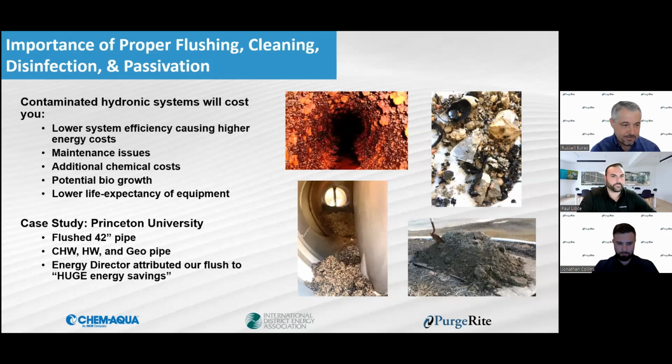I've seen strainers not only clogged, I've seen $500,000 problems, lawsuits over compressed strainers because the system wasn't flushed. You've got other maintenance issues and additional chemical costs, bio-growth, things like that. We'll talk about that.